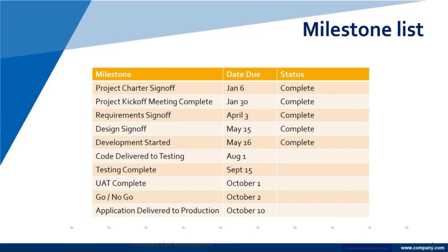The milestone list does not have the entire activities list, nor does it have the WBS. Typically, what project managers do is they insert milestones within their either work breakdown structure or work breakdown structure and activities breakdown structure, which most project managers have embedded together, and they use tools like MS Project or any number of things that can have that information together. So that's what this is looking at.